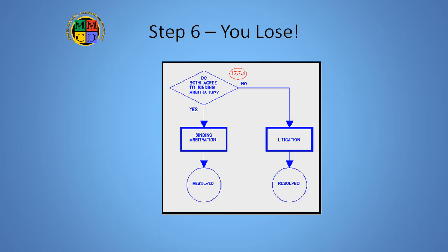Having failed to resolve the dispute consensually, the two parties will only get one more choice. Will the decision be imposed by an arbitrator or a judge? Failure to agree on the use of an arbitrator will default the process to court.